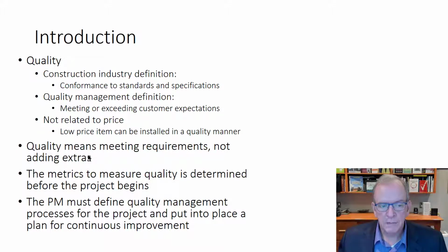And this is something I've put in there. It needs to be clarified. There's a term called gold plating. And gold plating means doing extra things above and beyond what you're supposed to do. One of the problems with gold plating, sometimes when you do extra things, you think it's what the client wants, and it's not even really what the client wants. Sometimes the gold plating means that you've done something extra at the expense of something else you were supposed to do.